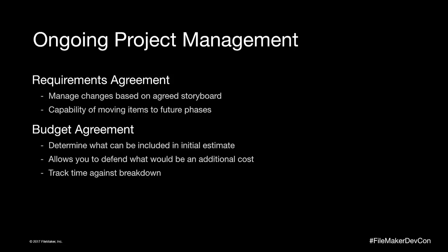The other thing about going through all of this, as I said earlier, is you can gather metrics. I actually have a tool that I use. I have a really, really stripped down version that I'm sharing with all of you. But it breaks down all of my pieces just like I told you I do. And then it actually tracks my hours based on what I actually invoiced. And so I can compare and see how many projects I'm within budget, how many I have been over.